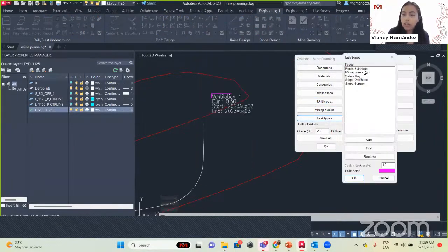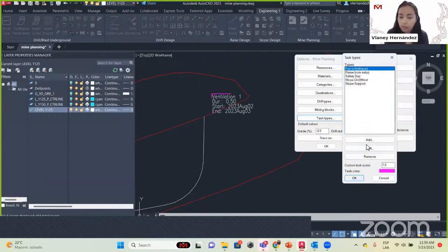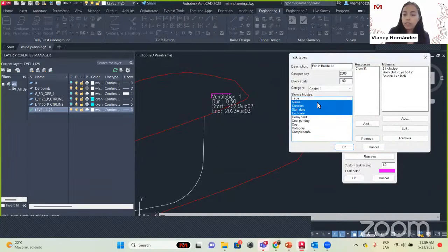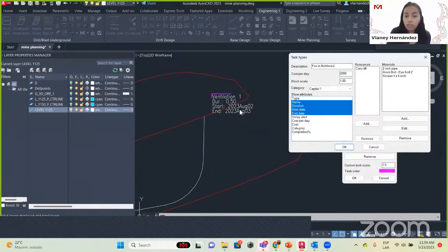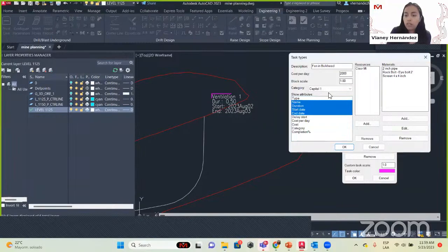The date is set to 'as soon as possible' — when we are done with this part. It says one day but it is 0.5, so it calculates accordingly. We select the calendar and click OK. The information shown in the block is what we selected in Options: the name (ventilation 01), the duration (0.5 days), start date, and end date. We can also add delay start, cost per day, cost, category, and completion. You can insert this information into these blocks.